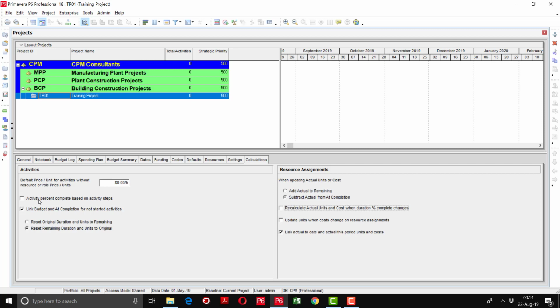You can divide this activity rebar fixing in different steps, like shifting of rebar from the store to the rebar yard, cut and bend, then shifting to the site. Normally, when you shift the steel after cutting and bending to the site, there is some percentage associated with these activities. So, if you want to update the progress on the basis of these steps, you have to specify the steps against each activity. In this way you can add the progress. So this option is only valid for the physical type of percentage complete.